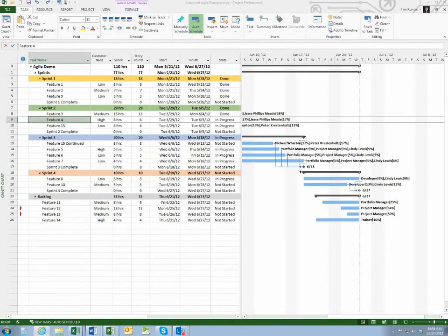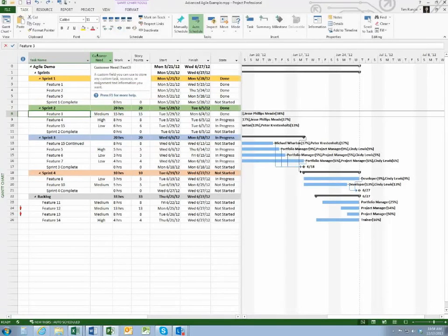The value is that in Project Professional, or if you're using Project Pro for Office 365, which is kind of streaming, you didn't need to install it, and you pay a month-to-month subscription, you can pick a text field, you have number fields, but we can create a named column that says, here's what it is, it's a customer name, and I don't want to type this in, I want to draw from a lookup. And so you can set your priorities, low, medium, high, put in extra high, or you can say it's small, medium, and large, or XX large. The idea is that I have a drop-down that I can leverage as I put these together.